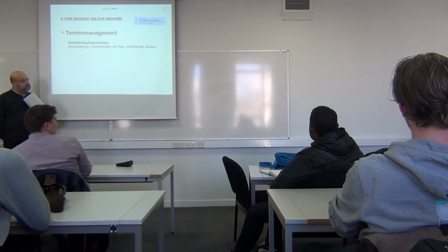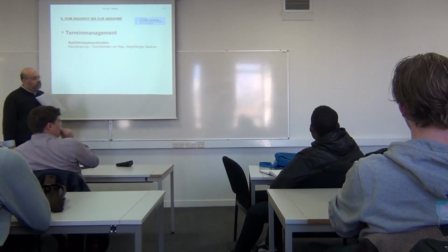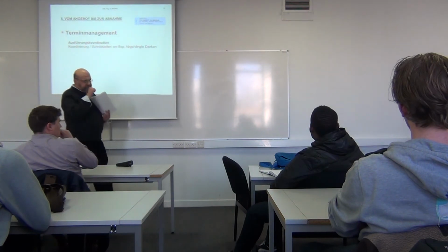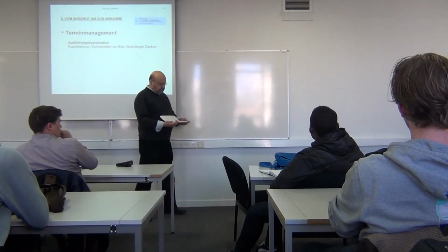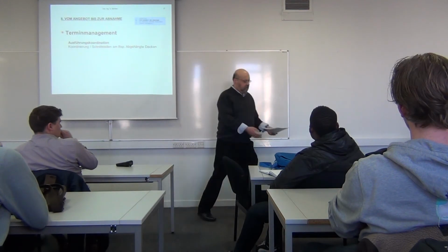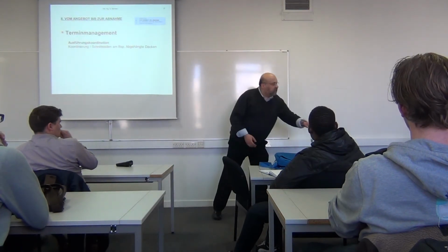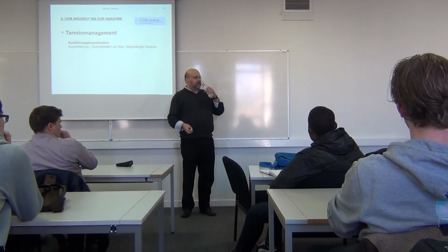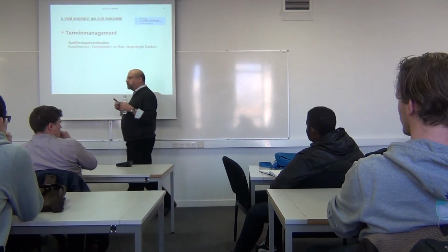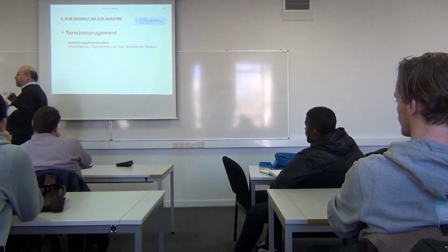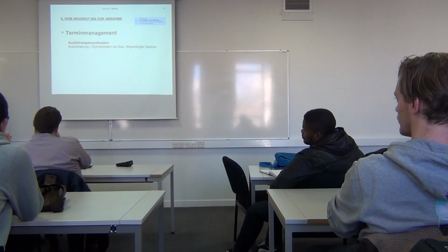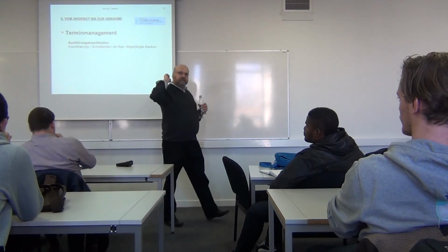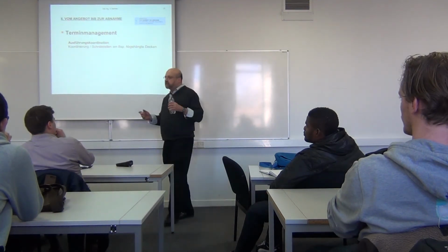And you're quite right, in the Middle East we don't go by the standard, we price it from scratch and then the positions are tendered on the package basis. This depends on what your subcontractor can do. So this is a little bit the difference. But it would be a real problem if we leave it all to the contractor, because then the contractor defines what the time of the whole project would be, because one contractor says it's 10 months, the other says it's 11, the other says it's 13 months, and so on.